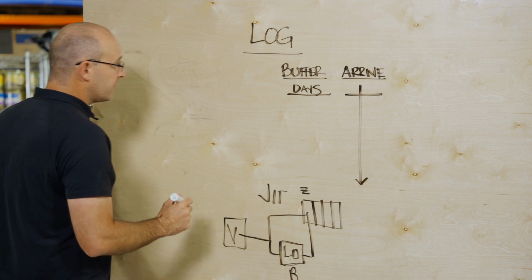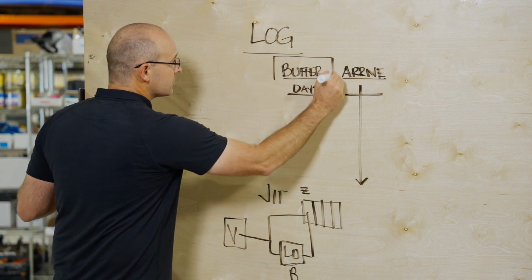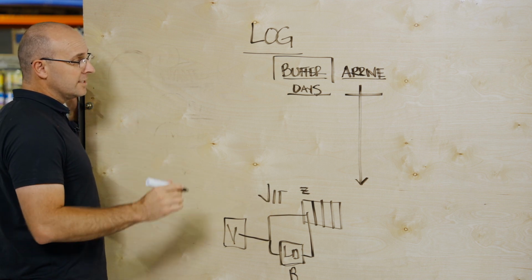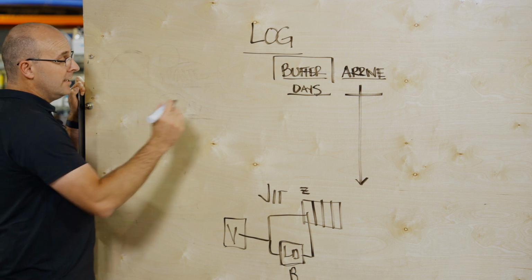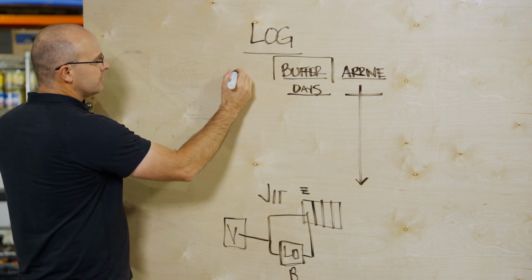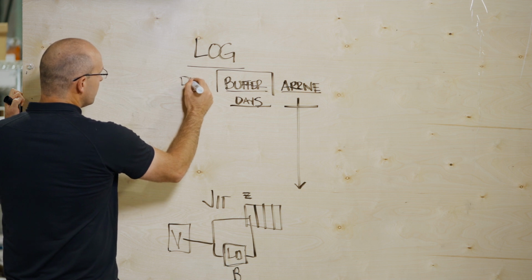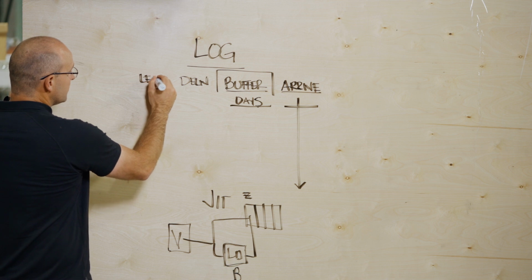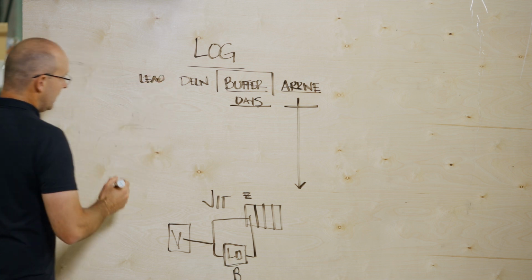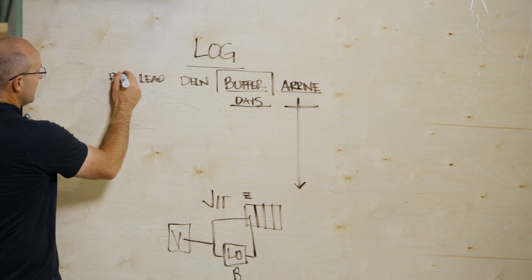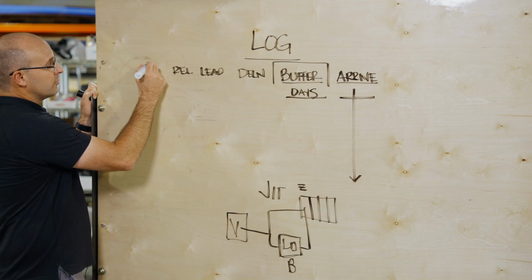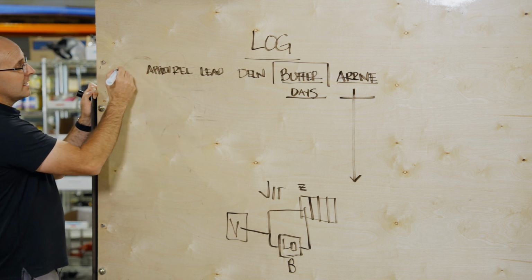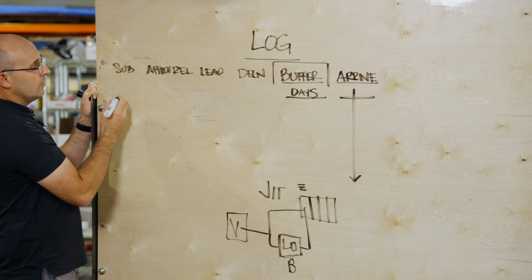Okay, so this buffer column is probably one of the most overlooked categories, columns, or metrics in the entire industry when it comes to material procurement. Then, as you work backwards, there's the buffer, but there's also the delivery time. There is the lead time, which should include fabrication. Ahead of the lead time, there is the release. There is the approval process through the designers. And then back here, there is the submittal process with the trades.